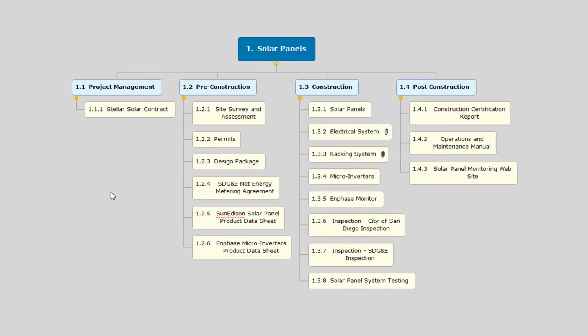The next step is to reorder the deliverables. Remember, this mind map is a representation of the statement of work. We have not focused yet on the decomposition process. I'm just trying to create a mind map of the SOW. It is nice to reorder based on the overall sequence of deliverables from the standpoint of when they would be created. But again, do not focus on scheduling. It's strictly to reorder, just so you understand the top, bottom, left to right. Let's look at some examples right now.